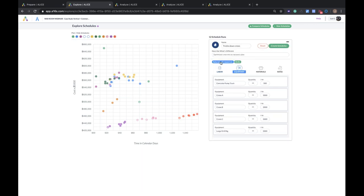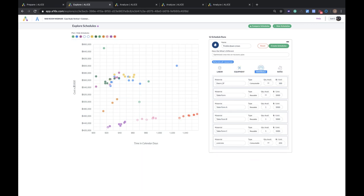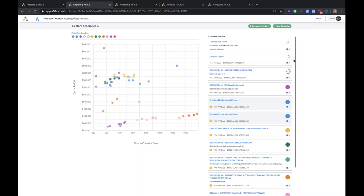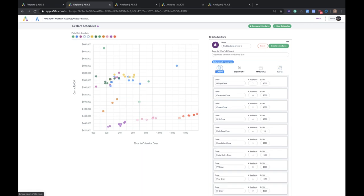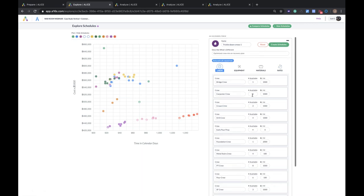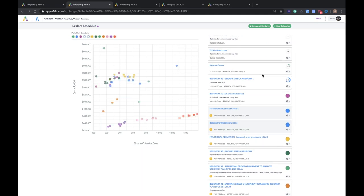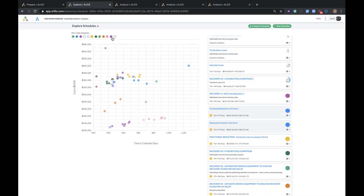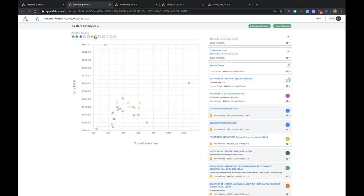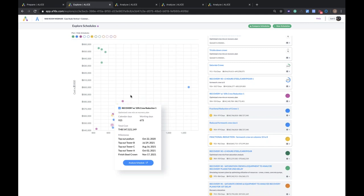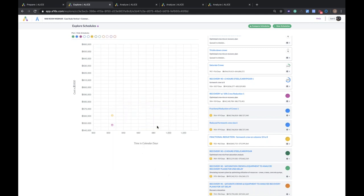What about our pour crews? Data is showing us that we can make some reductions here. What about the crane crew? Looks like if we reduce the crane crew, we may have some delays because the two crews are being consistently utilized by ALICE. So let's run these schedules. Let's go to six on the carpenter crews and six on the pour crew. And let's keep the structural crew at eight. Let's also saturate the equipment to see if there are any different mixes of equipment that we can actually use. Now I'm going to hide some of these dots so we can just look at the newer schedules.